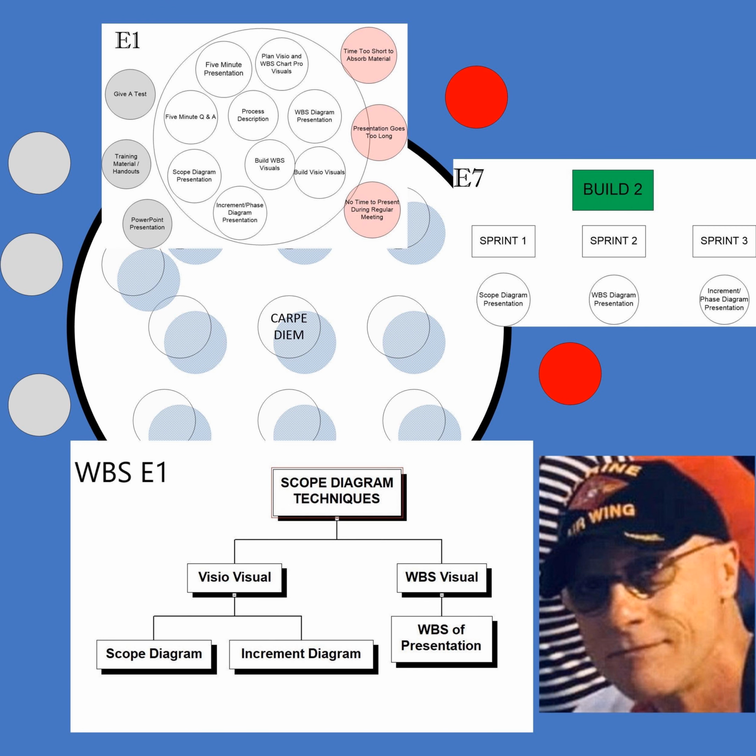But you can see the other things we procured, the MDBPUs, the power, upgrade some of them, network equipment, etc. And you can see procure network equipment for Z and network equipment for X. So that was there. So now, whatever was in the scope for procurement, there it is, under one list, right? So when you put it in your project plan, you just take it from here.